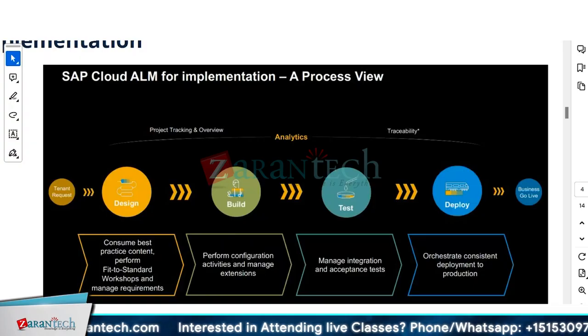Depending on the type of SR, it could be 1 day, 3 days, 7 days, or 14 days. To give you an example, to renew a certificate in development, because when you are integrating with third-party systems or cloud solutions, there will be an interchange of certificates, for authentication, for smooth SSO, right. Certificates, if I'm not wrong, have a lead time of 7 days or 14 days. I don't remember correctly, but for sure it is a minimum of 7 days.